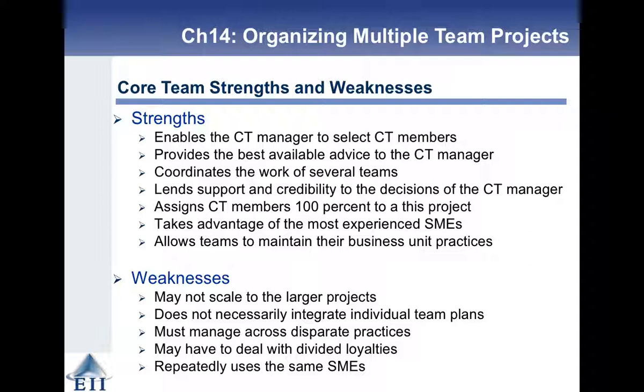Strengths: it enables the core team manager to select the members, it provides the best available advice, it coordinates the work of several teams, it lends support and credibility to the core team manager, it assigns members 100% to this project, and takes advantage of the most experienced subject matter experts. It allows teams to maintain their business unit practices. Weaknesses: it may not scale for larger projects, doesn't necessarily integrate individual team plans, you must manage across disparate practices, they have to deal with divided loyalties, and it repeatedly uses the same subject matter experts.